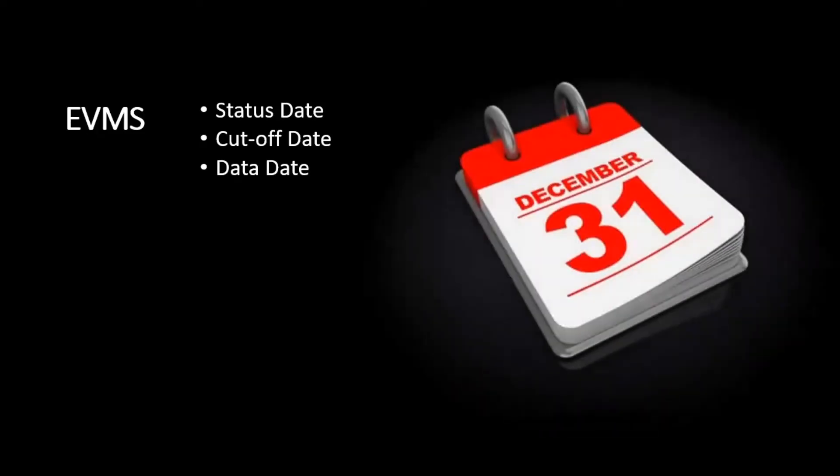First, you must understand what a cut-off date is. Let's say our project starts on 15th December 2019 and ends on 25th April 2020. Today is 2nd January, but I need my report up to 31st December 2019 — that date is called the status date or cut-off date: the date on which you want to know your project status. Data date is the same concept; all three terms carry the same meaning.